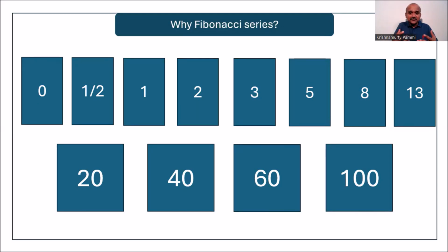On top of that, story point estimation is a relative size estimation. So we are not 100% accurate; we are approximately 85% accurate. For example, if you think a certain story is more than 3, then there is no 4. You have to go to the next level, that is 5. So this is what we have to follow.